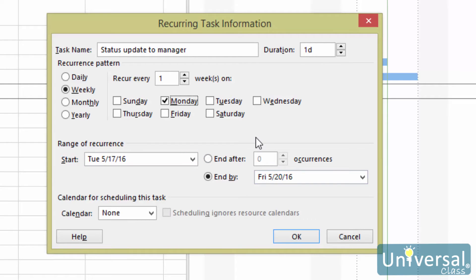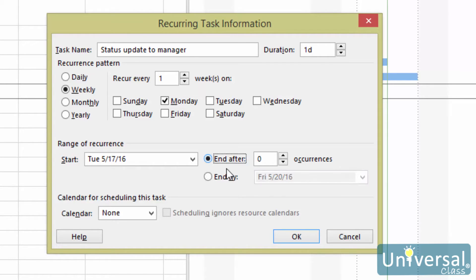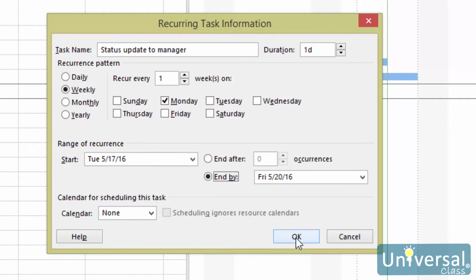You would set the start date in the start field, then enter the end date — which is six months later — in the end by field. You can also set it so that the recurrence ends after a certain number of occurrences by checking the end after field. Choose the calendar you want to use, then click OK.